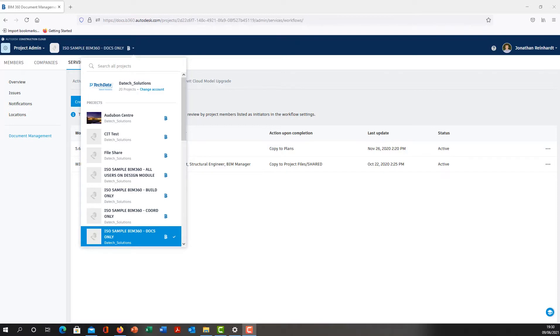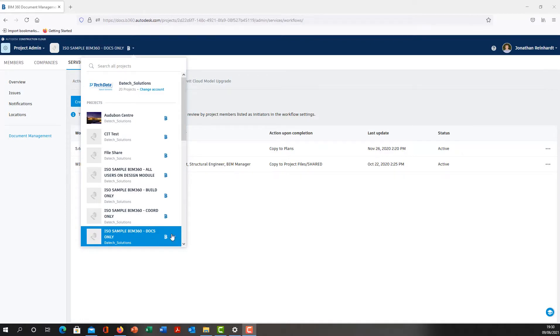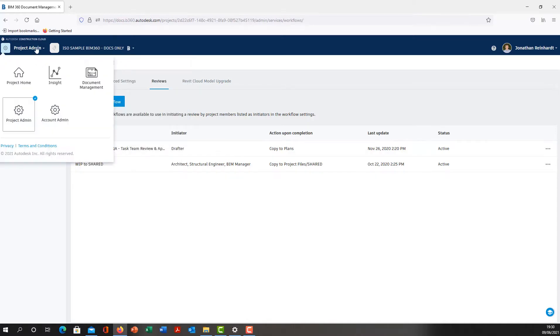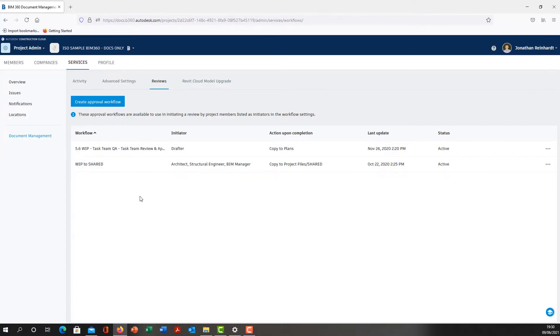To create an approval workflow in your BIM 360 project, first navigate to your BIM 360 project. This particular one is called ISO Sample BIM 360, set up as a project. Next, go into the Project Admin, assuming you have project admin rights. Then go into Reviews under Services.